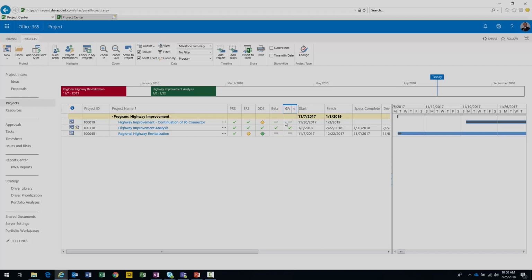Your organization is going to have milestones, and you're going to call the milestones what is important to you in your organization. I just chose to call mine these names here. So this can be a pharmaceutical drug release cycle, some kind of development program release cycle, whatever it is. It's unimportant what the milestones are called. All that's really important here is that these are milestones specified within a project at the task level, and we're exposing them here in a Project Center view.